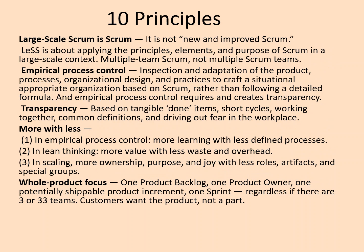So what are the 10 principles of LeSS? The first principle is that large-scale scrum is actually scrum — it is not new and improved scrum. LeSS is about applying the principles, elements, and purpose of scrum in a large-scale context. The second principle is empirical process control — inspect and adapt the product using the same empirical processes as in scrum. The third principle is transparency, based on tangible done items, short cycles, and working to a common definition of done.